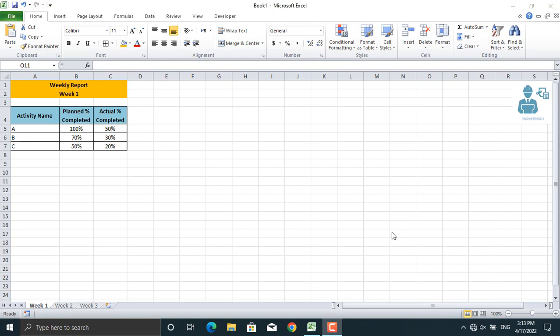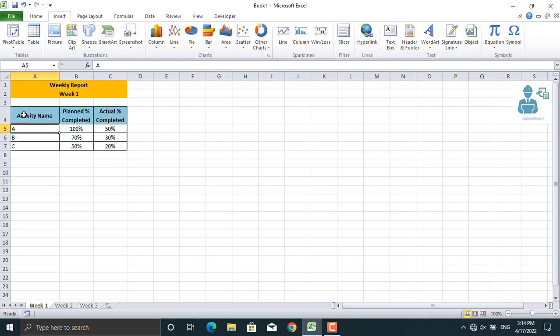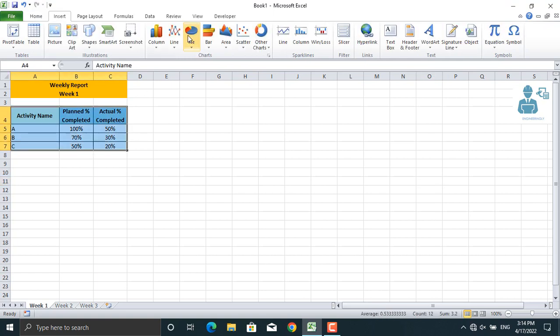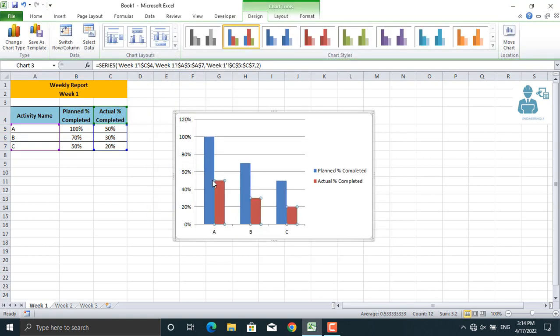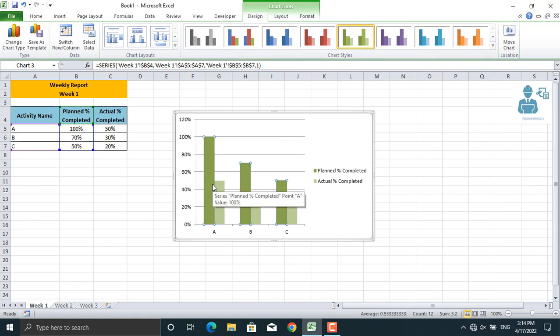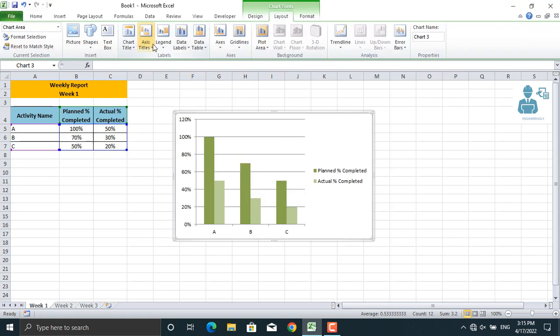Let me show you how it works. For example, this is the report for week one of your project. The activity names are given, planned percentage completed and actual percentage completed of each activity. The management wants a bar chart report of this data every single week. Let's insert the bar chart for this.